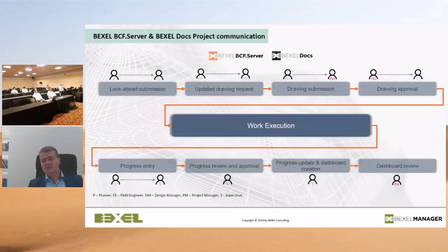So in this case, I will show you a short video where on a Bexel CD, we have used, of course, Bexel CD Cloud, but also Bexel BCF Server and Bexel Docs. And the following workflow will be presented in this short video. The planner sends the look-ahead plan to the field engineer. The field engineer has a question that certain drawings are not updated, so he asks a design manager to update the new drawings for certain things.